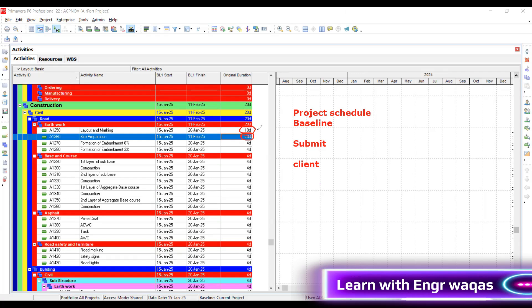They're also going to ask why you put a finish to start relationship among these activities. But there is a logic. Obviously, once I'm done with layout and marking, then I start site preparation. If site preparation is done, then I start formation of embankment, then first layer, then second layer. This is the logical thing.